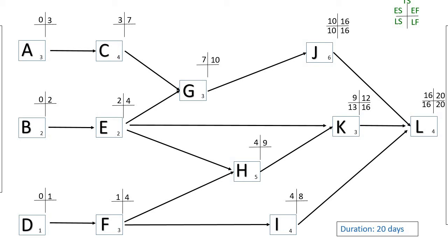I would take the late start of L. L finishes on day 16. The late finish for I would be on day 16. 16 minus 4 would be 12.